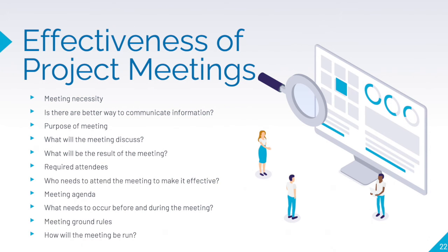Effective project meetings are important. There are a few questions that you need to ask yourself when thinking about conducting a meeting. One, is the meeting necessary, or are there better ways to communicate the information? What will be the purpose of the meeting? What needs to be discussed, and what are the hopeful results of the meeting? Who needs to attend the meeting to make it effective? What will need to occur before and during the meeting to meet the goals? And how will the meeting be run?